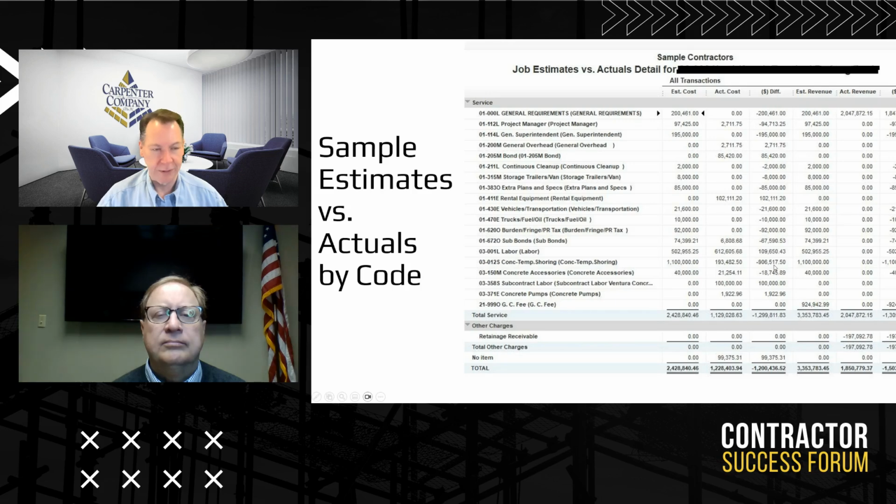They have a little over $900,000 to go on that particular line item. That's the cost side. A lot of contractors actually bill by the line item. This particular one is not a good example of that. They roll it all up into one line item, but when they do it that way, you can see, hey, we build, sometimes contractors do need to be set up that way, and we bill by 50% of this particular line item. We got part of it in place.